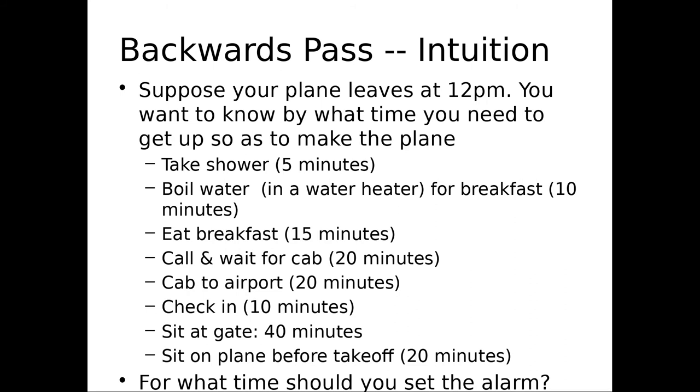How are you gonna figure this out? How do you figure out what time to set the alarm? What's the reasoning? Okay, the plane leaves at 12. Start out with call and wait for the cab. Or you can start from the bottom actually. Okay, so my plane leaves at 12. I need to get onto the plane. If I want to be on the plane 20 minutes before takeoff, I need to be on the plane by what time? 11:40, right? 20 minutes before this. So I need to arrive at the gate by what time? 11 o'clock. And so I need to get to check-in by what time? 10:50, right? I need to get in the cab by what time?